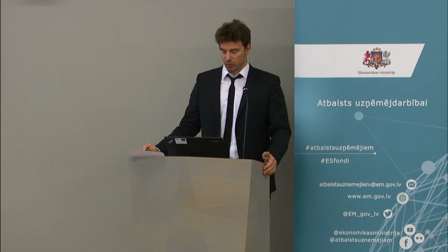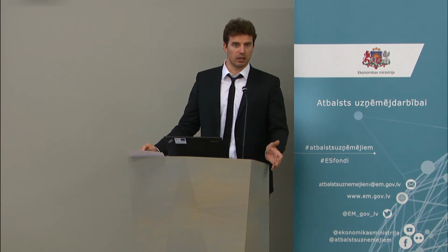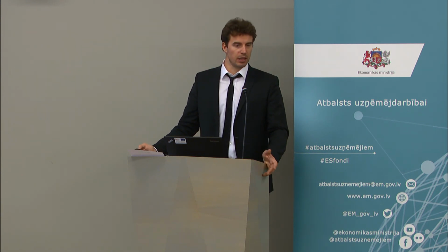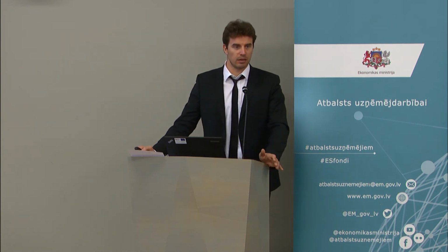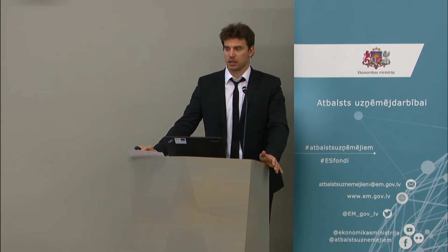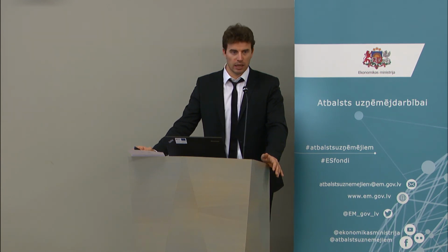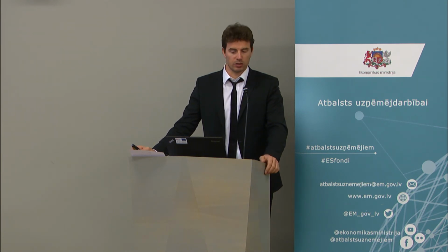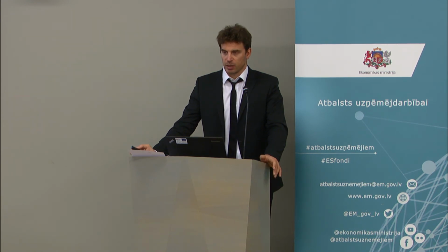The construction supervision in some cases can also be the designer itself, but usually, at least in big projects, it is an independent party that is identified by the client. So the client, I will also show later, the organization of an example with a project that we have now in Austria. It is an independent company.